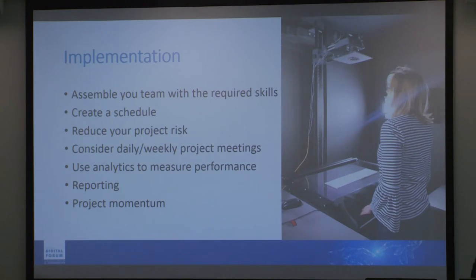Reduce the risk. So we really recommend using a pilot to prove your process and test your assumptions, and that's on workflows, timings, image quality, end deliverables. It's also a chance to identify health and safety risks. People come in different shapes and sizes, they have different requirements, and it's good to be adaptable to change your workflows to suit an individual. And out of that, you need to update your project plan to reflect discoveries or lessons learned. So once you have the pilot outcome signed off, you can scale up to full production with confidence.